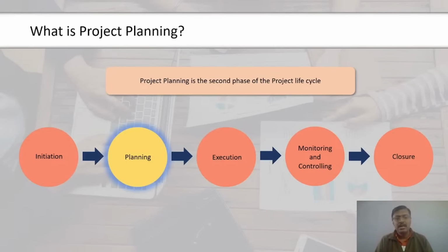So the bottle looked very simple. Now the same thing if I visualize for a car as an example. I can say car interiors, car exteriors, and intelligence of the car as three main breakdown parts. Similarly, under interiors, I can speak about the seat, the gear lever, the steering, the floor, then the dashboard. I can have that breakdown.